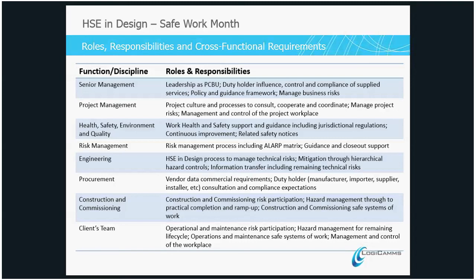If that information is not available when the contract is let, then in some cases some contractors may use that as a variation claim. So to avoid those sorts of situations, the best bet is to try and be upfront in your contract negotiations and things like that early on, so that those other duty holders are aware of when this information will become available from your design.